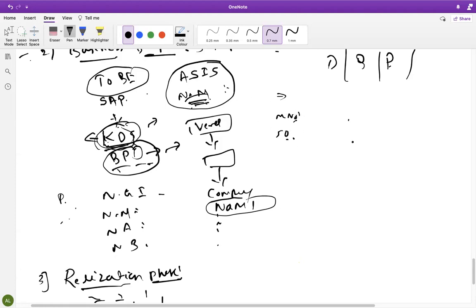We'll tell them, this is there in SAP, use this one. But if they are telling us they don't want that, they want 50 characters only, that particular customization which they are asking for is not possible in SAP. What will we do in that situation? We'll put their requirements into a gap document, GAP. Whatever gaps we have identified in the system, we'll put in the gap document, and this gap is fulfilled by developments.